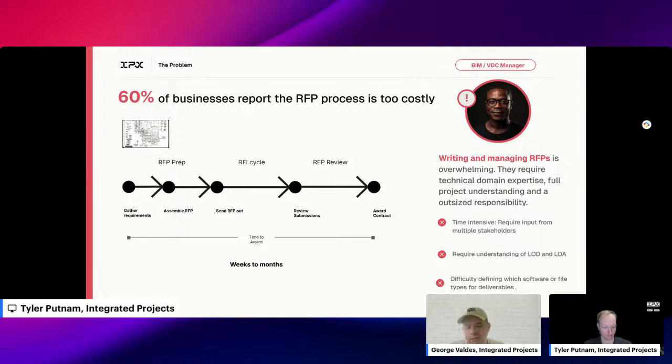And then there's a waiting period for those proposals, and then you enter the RFI cycle, where different folks might try to fill in the gaps of the proposal itself by asking for more information. In that cycle, you disseminate those questions to everybody, to give everyone a level playing field on the context.